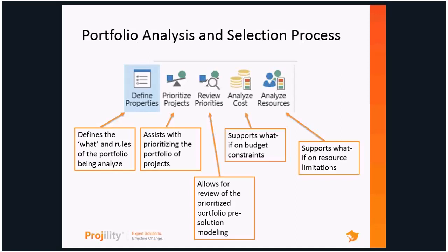So the ability to analyze your resource requirements, and part of your demand management process, remember, is what are the resource requirements for each project or potential project. We can do that formal analysis to say what should and shouldn't we do, what can and can't we do, and by the way, what's a good resourcing solution? Now, do we bring people in from the outside? Do we push work off? We can play with the triple constraint, the schedule, scope, and budget in different ways here.